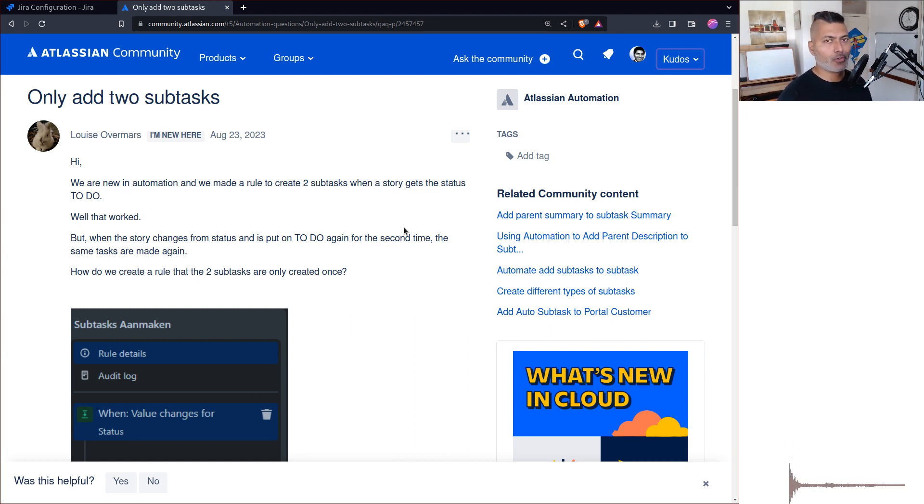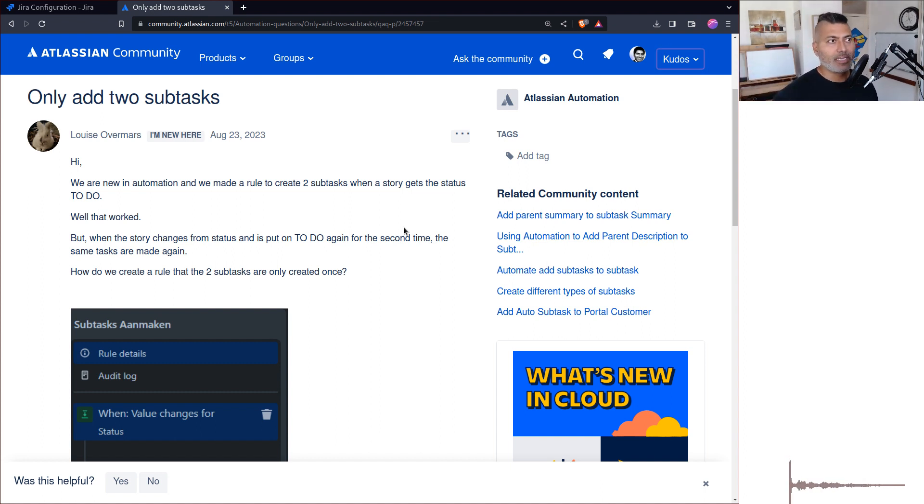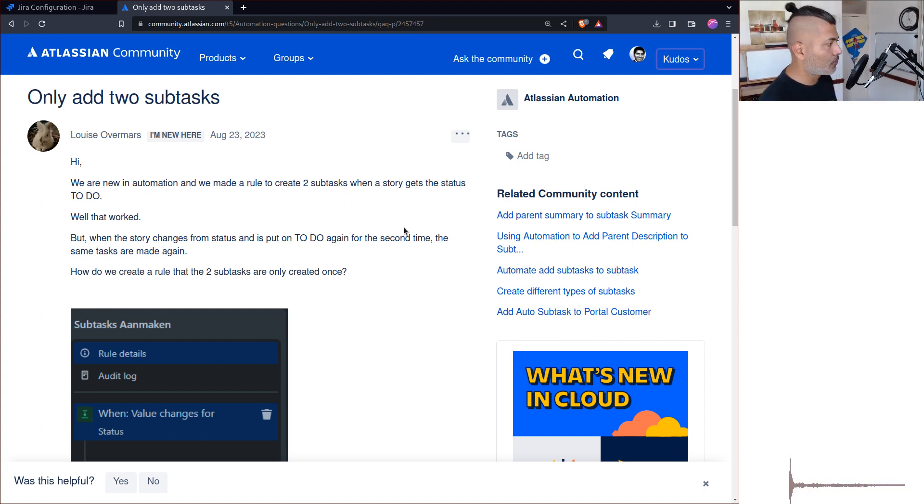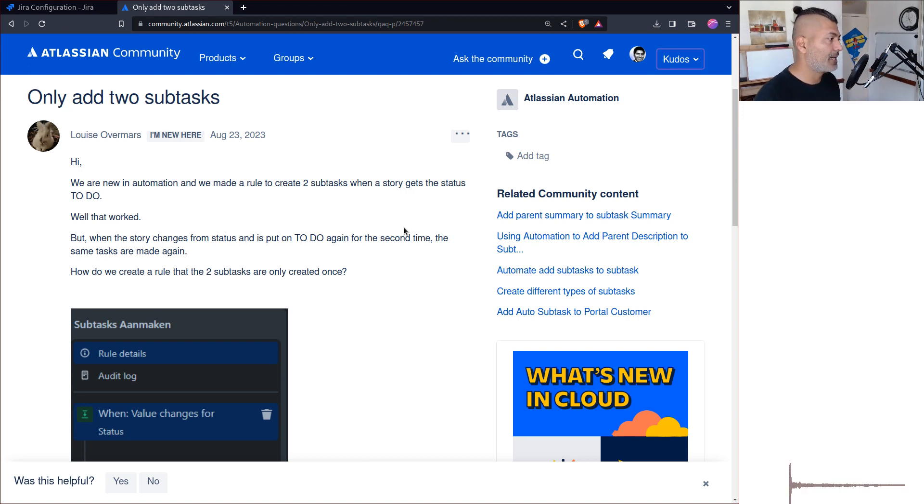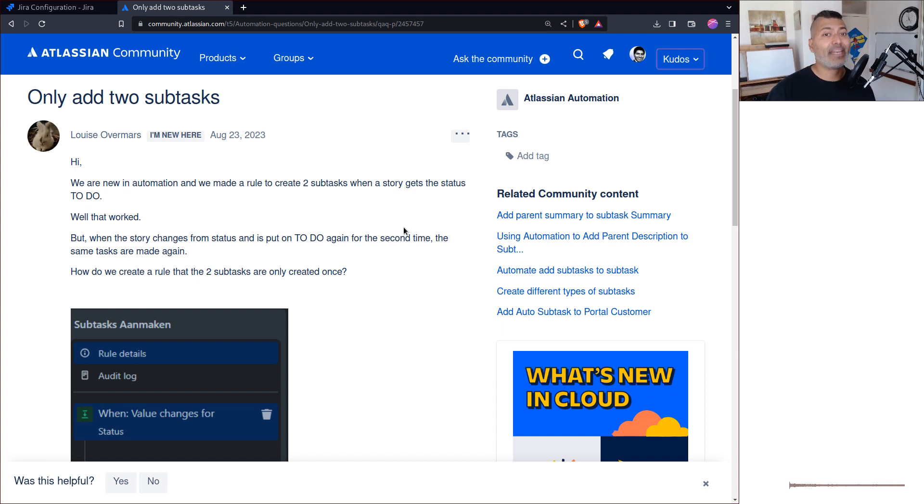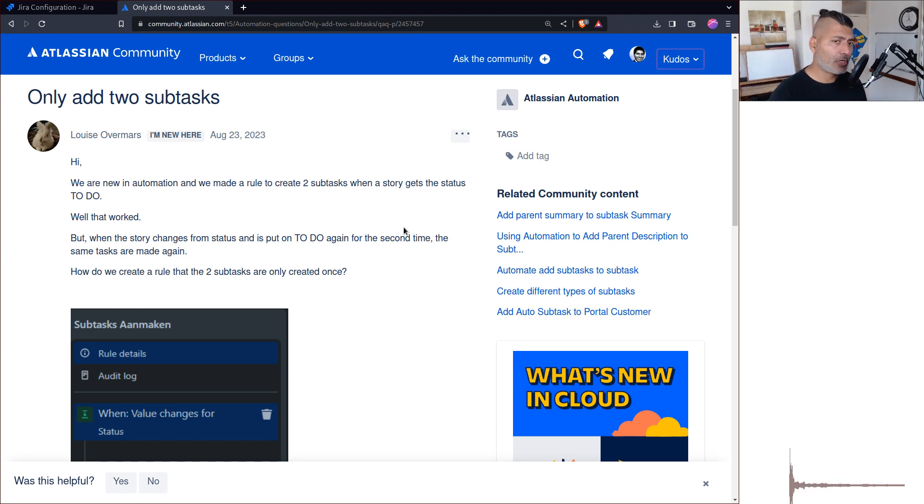You can go back to the previous state and execute the transition again which you did earlier. In those cases when you have a rule that's creating some task, your task automatically gets created again and it can be annoying. This is very common.